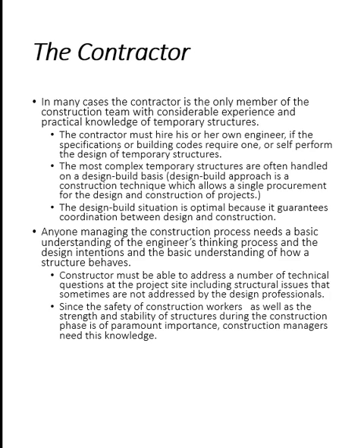Often when you have complex structures, use a design-build basis. What that really means is you hire a contractor or form builder, and they design it and they put it up for you, and then they take it down, you are done, and they move things around. Obviously if you get someone like this, they're going to be a specialist. You're probably going to get optimal form design and the cheapest price. Although it's not saying it's going to be cheap, in terms of the overall project, they're probably going to be the most economical for you because there's a lot less risk. Things can just progress a lot better.